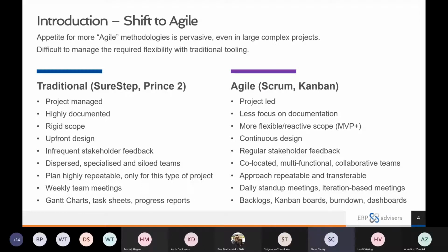But these more agile approaches tend to have a number of characteristics. They use key milestones for tracking progress, usually called iterations. They allow greater flexibility to build and tweak your detailed design throughout the project lifecycle. They allow the team to manage themselves within a boundary. They use objective measures alongside traditional subjective method analysis to improve progress reporting. Teams tend to work in shorter phases or iterations, and we tend to surface progress at regular intervals. I've seen that a lot, and that adds some real value. Microsoft Dynamics can help with quite a bit of this because the inbuilt tools in Dynamics are geared towards it.